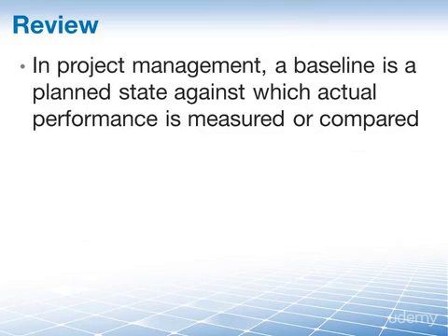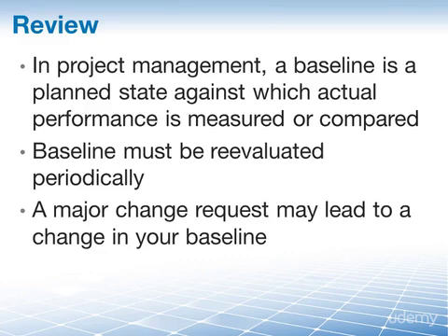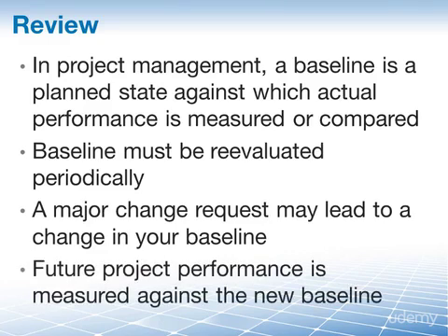Let's review. In project management, a baseline is a planned state. We draw a line in the sand and we say, this is what we think our project is going to look like, and this is what we will measure ourselves against. So actual performance as we move forward is measured against this original baseline. Then, from time to time, we must go back and we must evaluate our baselines and see if they are still valid. If they are not, if we had internal performance issues, for example, we may need to rebaseline. A major change request may require a change in your baseline, and once you have rebaselined, that means that your future project performance is now measured against your new baseline. And this concludes our look at the project baselines.